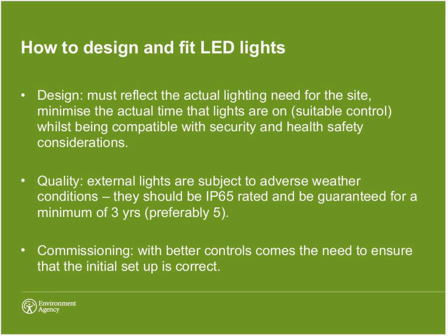So at the end of the install at our regional head office, it was a walk round, out of hours, in the dark, looking at every light. Have we got it set up right? A few lights were a point too high up and they were dazzling. It is important to go around and commission it. So I couldn't emphasise commissioning enough in terms of that design aspect.